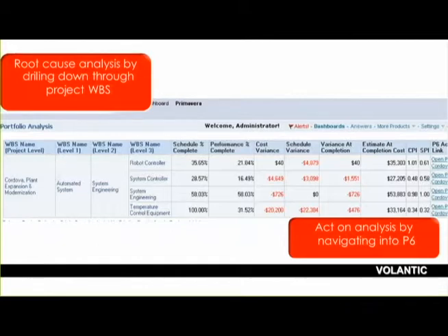And then from here, when you drill into where the problem areas may be, you can open P6 EPPM, and you can take those corrective actions and correct that information. Analytics is not the application you log in and put data input into. P6 is where you're going to put your information, and then P6 Analytics is going to allow you that analysis, which I just showed and displayed.